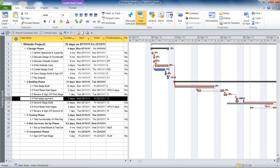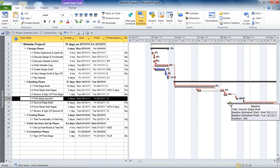The diamond appears on the last day of the task, so you can see it's a milestone and it is 3 days — your reporting will be accurate, but it just doesn't appear as so in the chart. A lot of people would be of the opinion that you should add a milestone task separately, put it at 0 days, and that is a true milestone task and a better approach. But there are the two main ways of doing so. I hope you enjoyed this tutorial — thank you for watching. Please check out some other tips and tricks at ComputerGaga.com. Thank you.